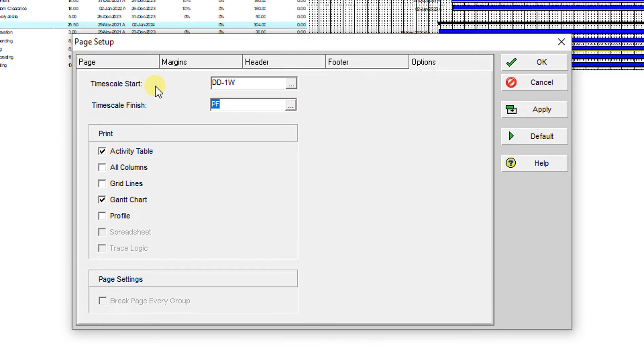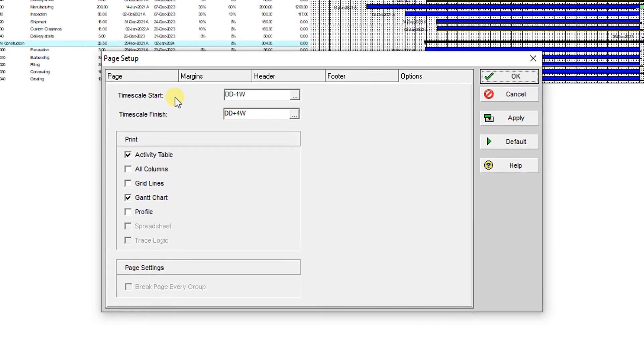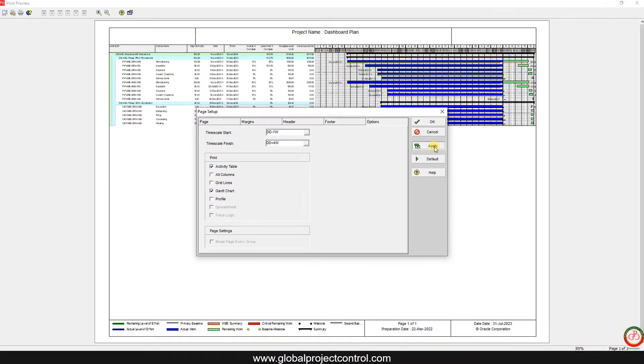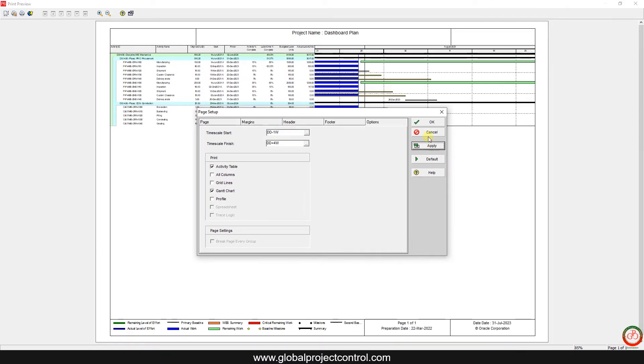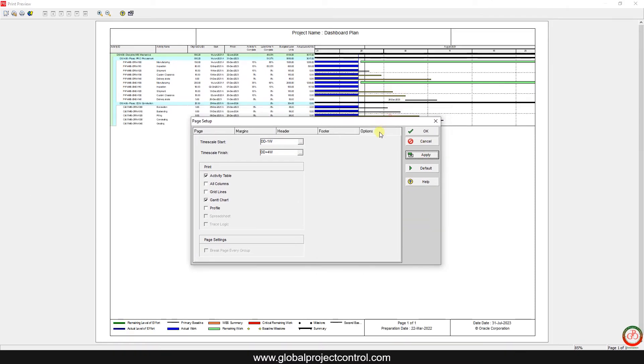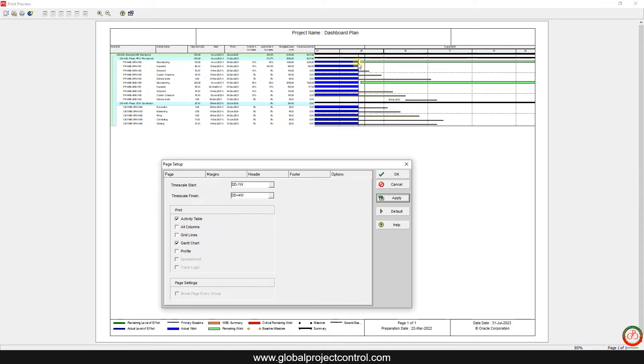To the data date plus three weeks, maybe four weeks is better choice. Then if I apply it, then you can find out my time scale is completely set up as my look-ahead plan.